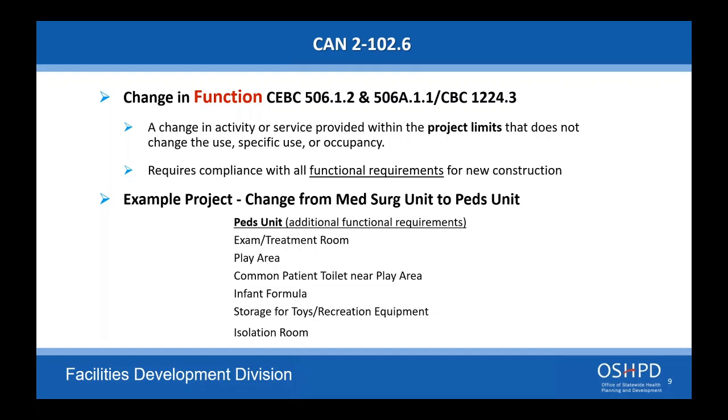It may. Again, you're remodeling the space. You're changing the toilet room, you're remodeling it. So it would probably need to be fully compliant. I don't see the question on the list, so I'm trying to go from what you're telling me. Oh, there it is. Yeah, if you're changing walls, it's a remodel. Again, you're defining the scope.